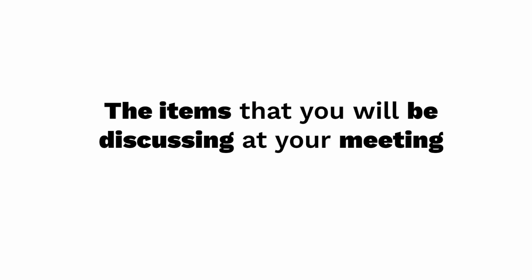So what are some meeting purpose examples? Do you need to review draft items for final approval? Do you have to resolve issues, brainstorm ideas, etc.? I always finalize my meeting purpose in advance based on my team's updates and comments in the WBS action plan. Okay, the second part of this agenda template are the items that you will be discussing at your meeting. This section is pre-populated in advance because it's based on the meeting purpose. They go hand in hand.